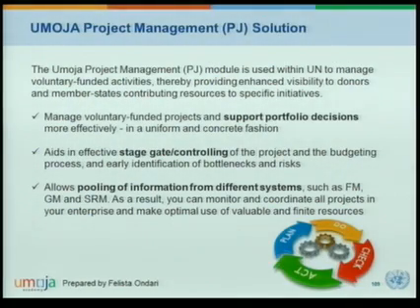So that was the grants management part, and now we are talking about the second function module, which is very related to it, and this is project systems. Project systems is the tool to define projects, and projects then can be linked to those grants. In very simple words, this kind of project functionality allows you to define a structure, and by defining structure, to define cost collectors. So you can define this is a project and this is the sub-project of this project, and then you can assign costs to those projects and sub-projects.